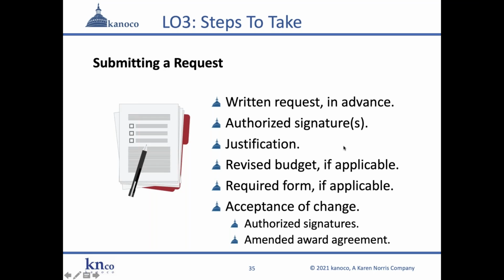Not, we need more money. There has to be some other reason associated with the project, the implementation of the project, that needs to be justification. It doesn't have to be long. It could be 2 sentences, but it has to be the right kind of justification. Then you need to revise the budget if that's applicable.